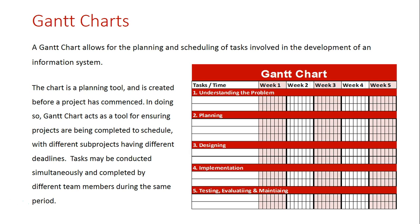Let's see how we can use this blank Gantt chart to actually schedule our tasks. In the understanding the problem stage, we may decide we're going to interview two participants and develop the required report. Those two things will likely be occurring side by side, so the Gantt chart will reflect that. In the planning stage, we will update the requirement report, maybe develop a requirements prototype, and conduct a feasibility study.